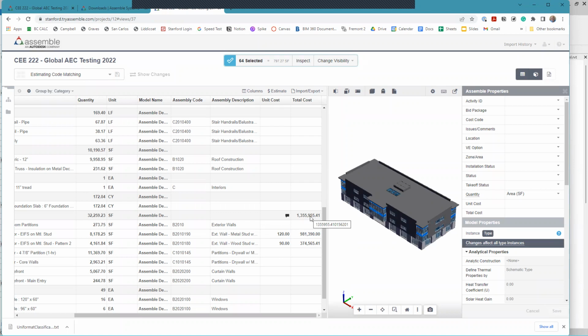Again, because you're doing it this way, if you had a different configuration but it used the same wall types, the same families in the different configurations, the information would flow across automatically and you don't have to do a lot of manual work adjusting it for everything. But the more common scenario that I think you're going to run into is that your design teams are going to change the Revit geometry underneath you, and you want to be able to pick up those changes and adapt your estimate based on those changed quantities. So let's take a look at that.